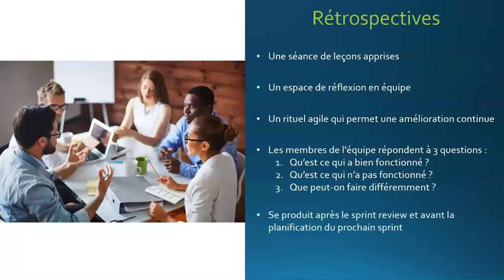This happens after the sprint review and before the next sprint is planned. It's pretty clear, and so it's a meeting that can last up to 3 hours for a month-long sprint.